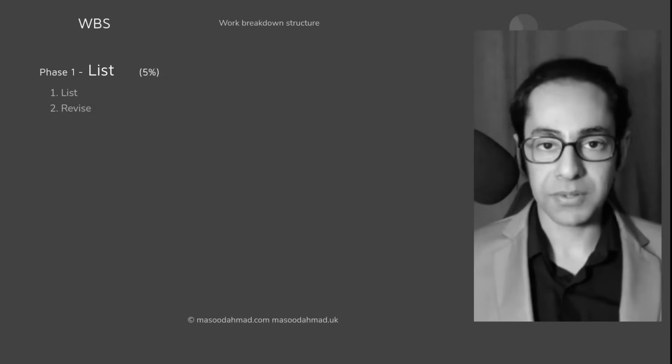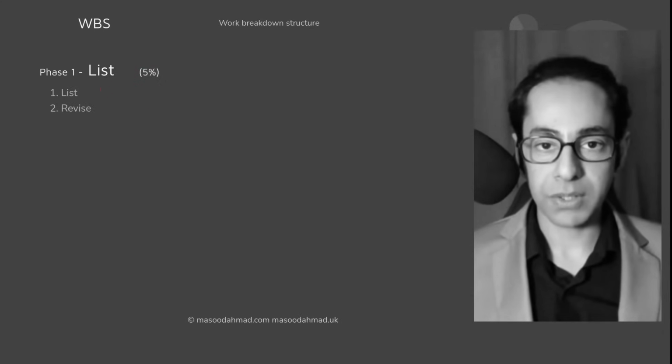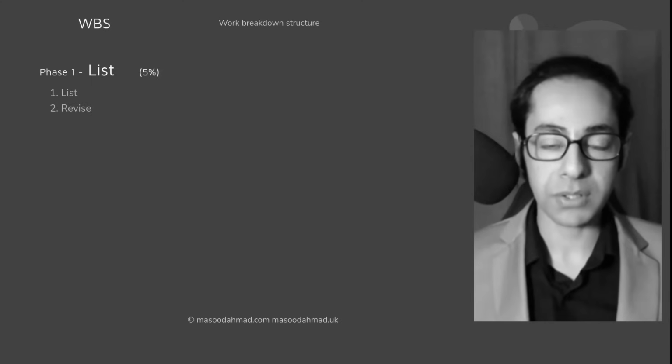Phase 1, list. As a suggestion, you should only give 5% of the total time spent on making the WBS. Step 1, list the structure. Do not do anything else other than just listing the structure. You will not give time, you will not add notes, you will not do anything, just the structure.